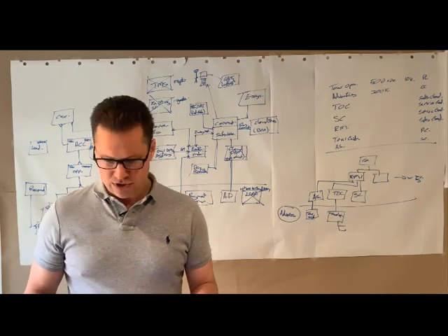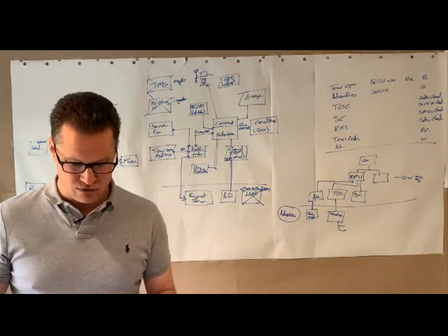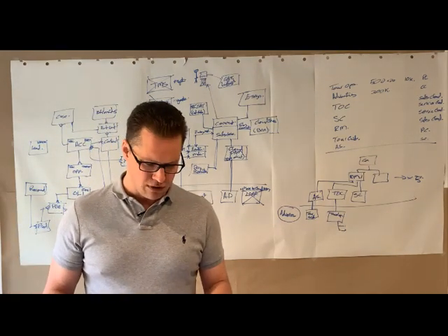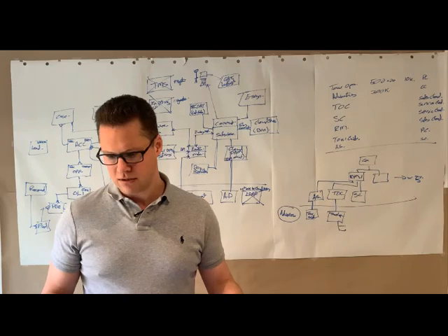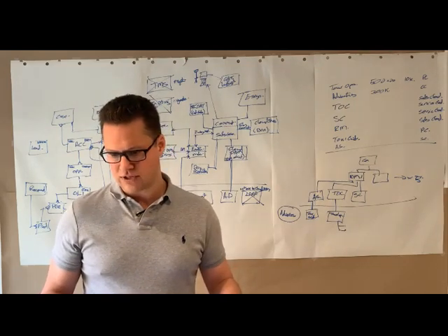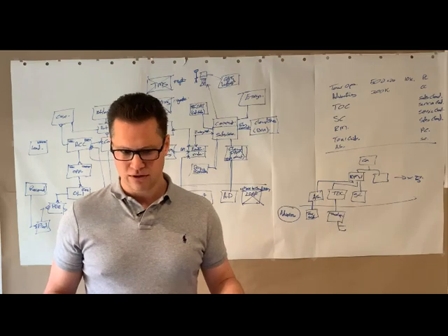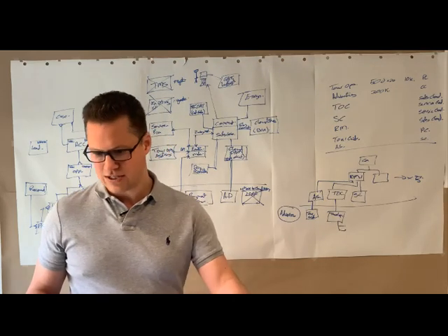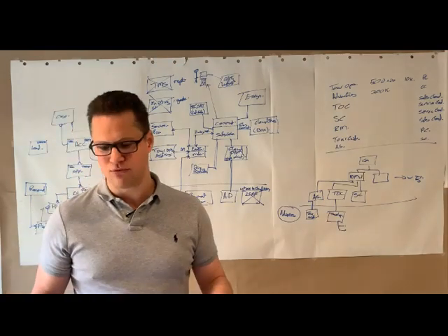And then what we would look to do in the planning phase is to identify key milestones where, for example, the Paymentforce integration will be ready by date X. Therefore, none of the Salesforce build use cases could be delivered before then.